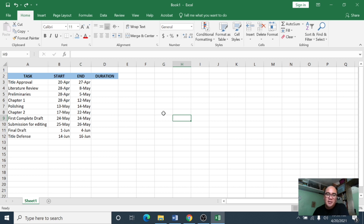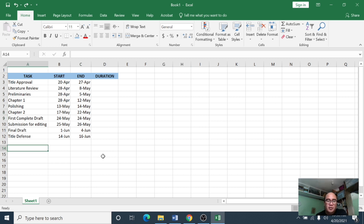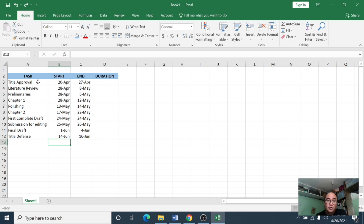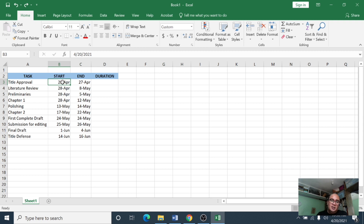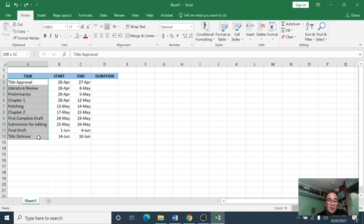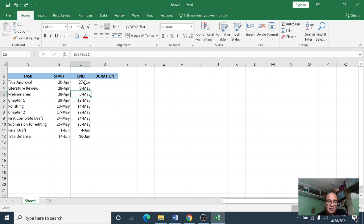I'm going to give an example of how to create a Gantt chart. Say for example you are working on a research project. The first thing you have to do is list down all the tasks you are going to do within that period of time — say within the semester — and then indicate when you are going to start and when you expect to finish each particular task. Here I have listed 10 tasks with their start date and end date, and of course the duration.